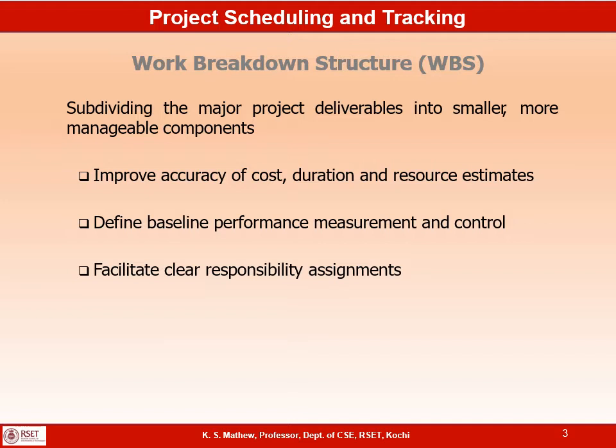For example, in the requirement analysis phase, we will get a major deliverable called SRS, Software Requirement Specification. Then we move on to the design phase, and we will have another major deliverable called the design document. So there are different major deliverables in every project. These major deliverables have to be broken down into smaller sub-deliverables, so that we can estimate the time required for developing or producing that sub-deliverable, and we can assign responsibility for that activity.